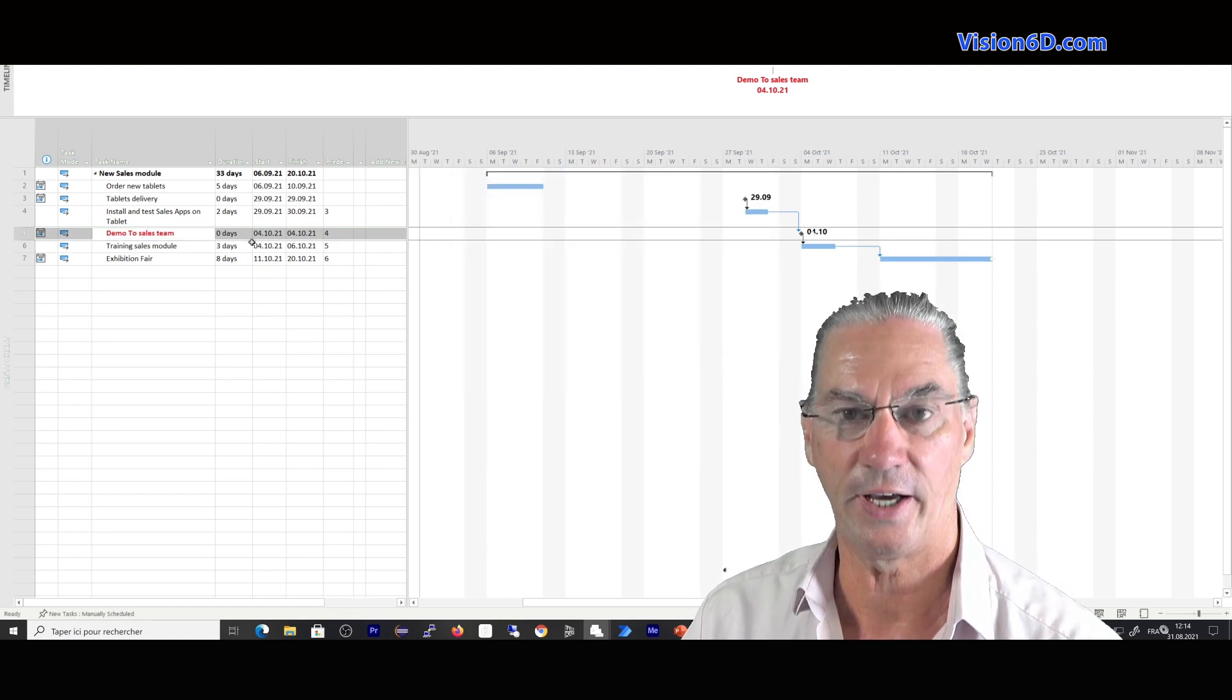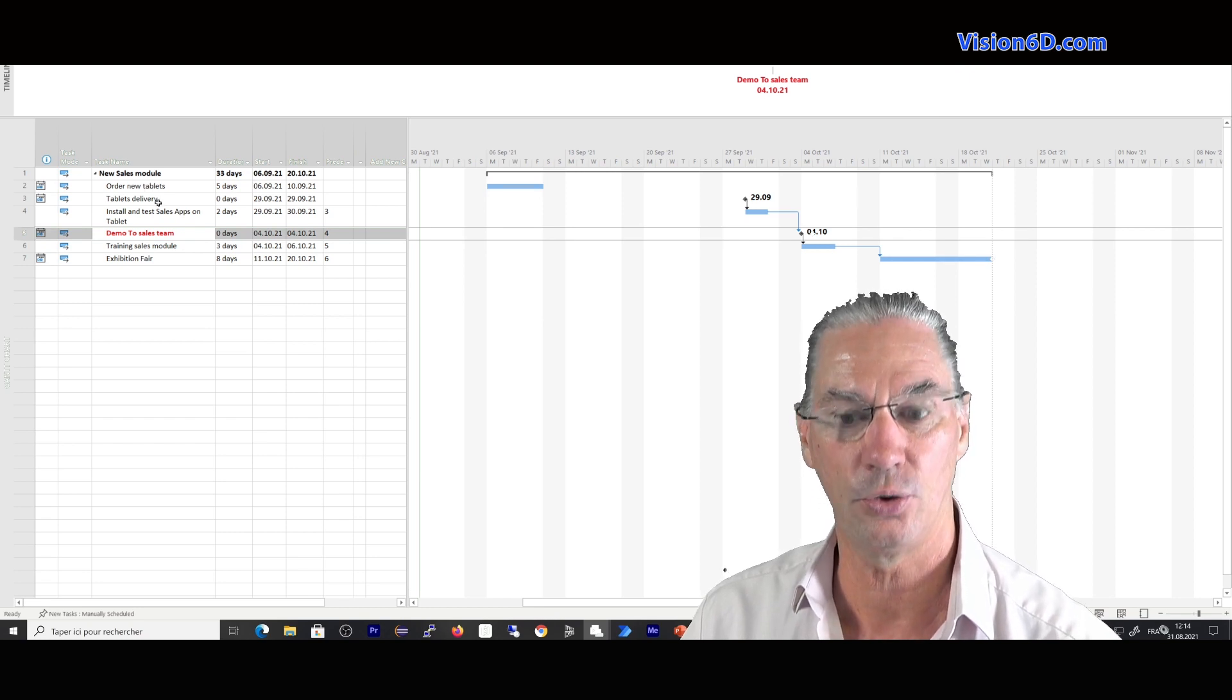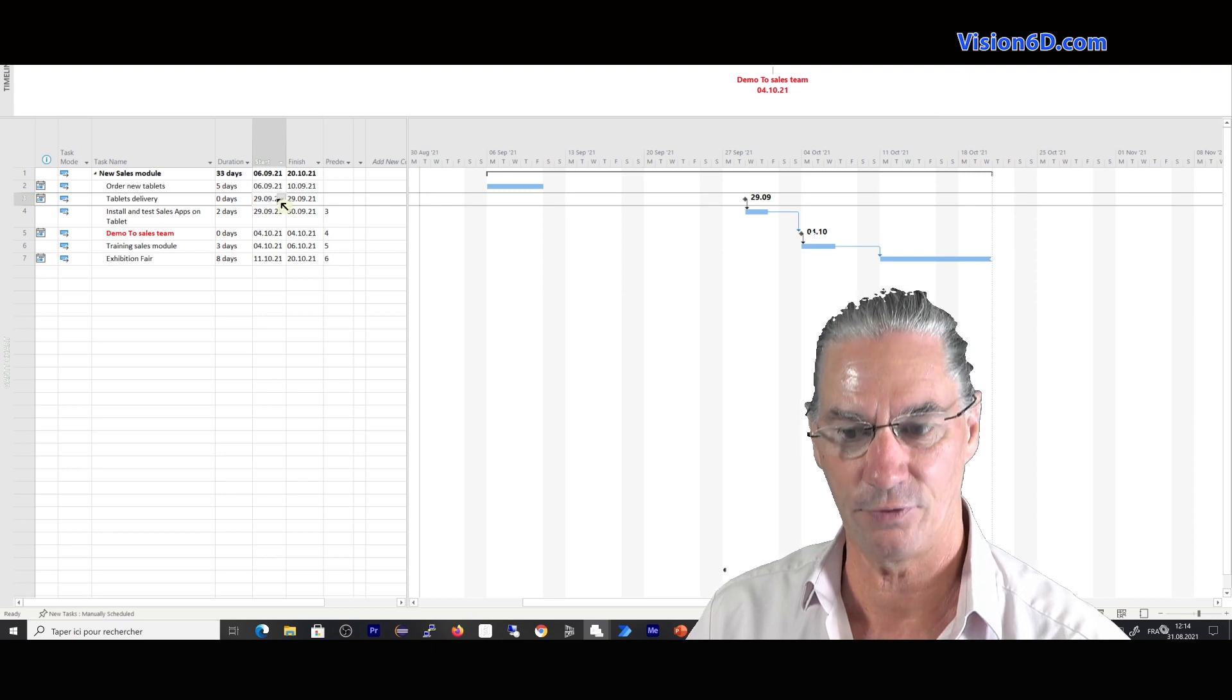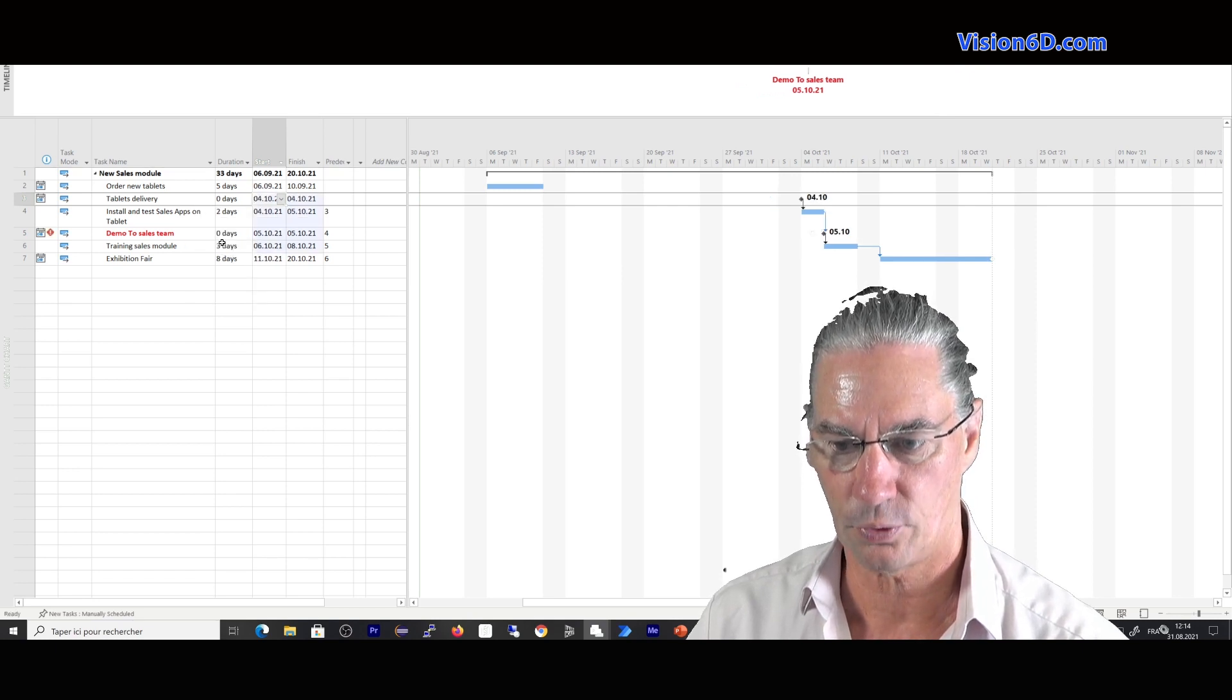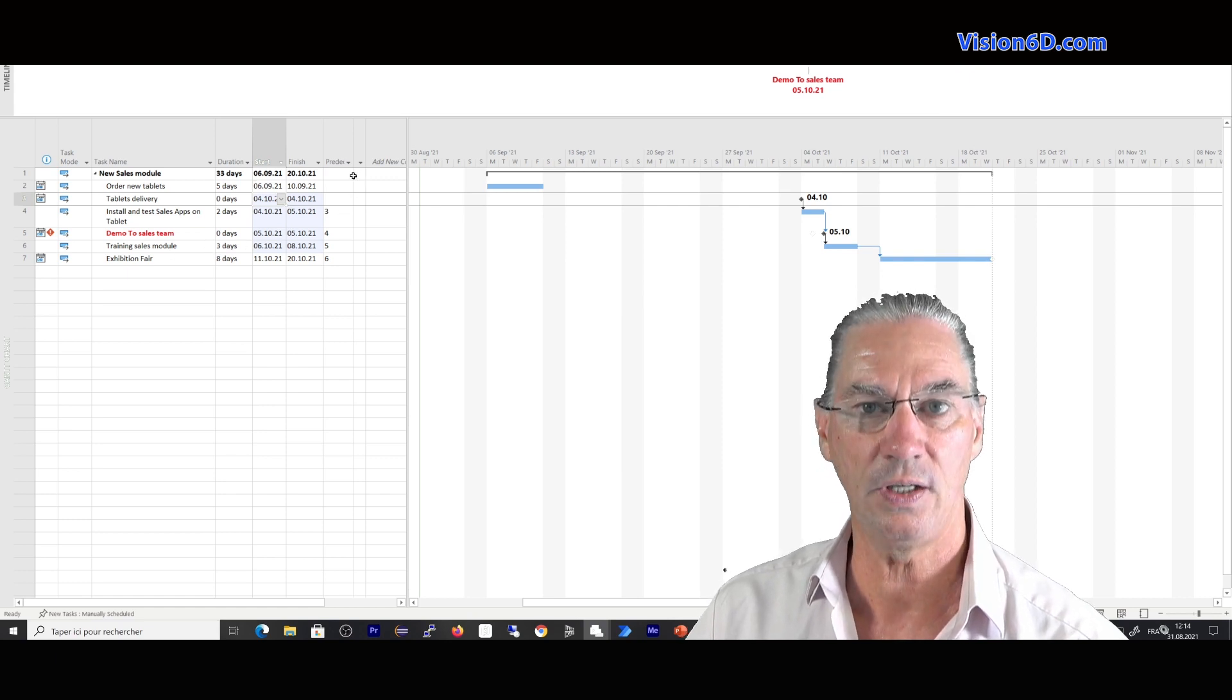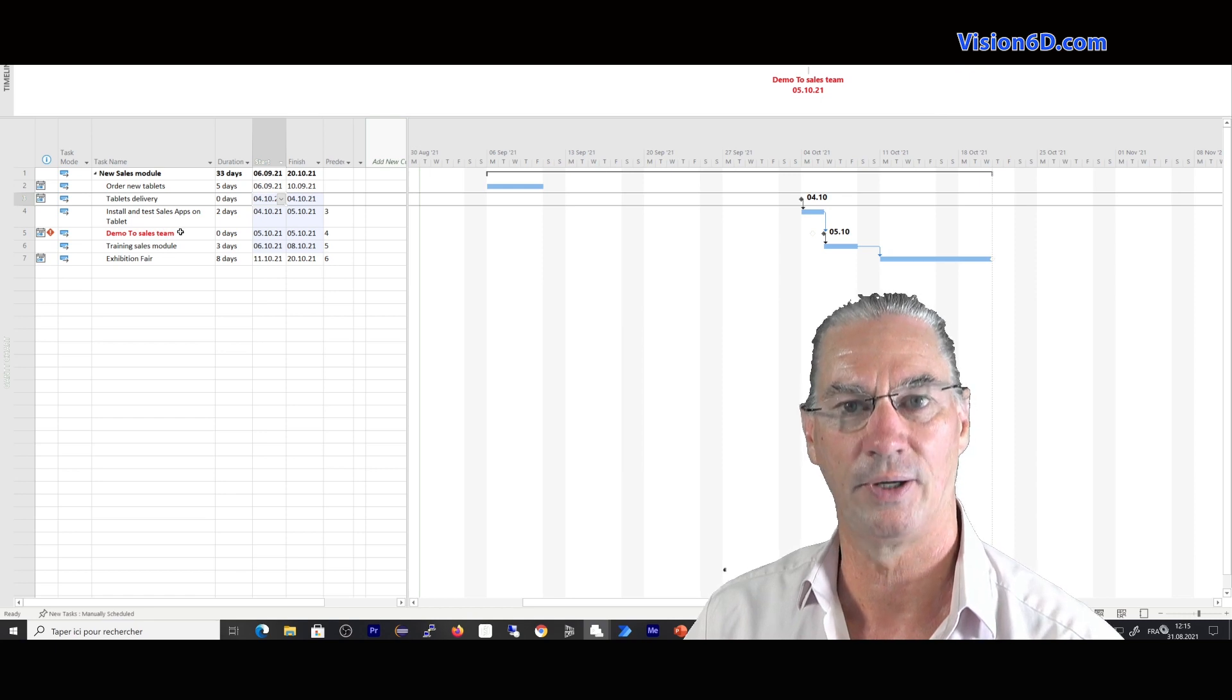And we see on the diagrams and in the table part, nothing changed, but we are going to check whether our change was as efficient as the one using the deliverable column and I come here on the tablets delivery and I'm postponing them to the 4th of October as we did with the columns. 4th of October. And you see the diagram in the GAN port has changed and the flag has come up. So although we don't see the deadline column, we really have deadlines set on certain tasks and here specifically on the demo to sales team.